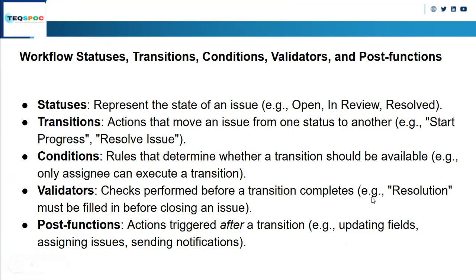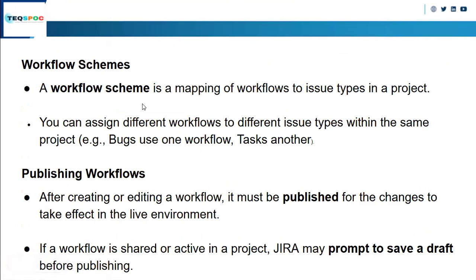Now, post functions are actions triggered after a transition, such as updating a field, assigning an issue, and sending a notification. These are the post functions which we can add. Now, workflow scheme. What happens when you want to create a new workflow? You create a new workflow, then apply that workflow to the respective project with the help of the workflow scheme.